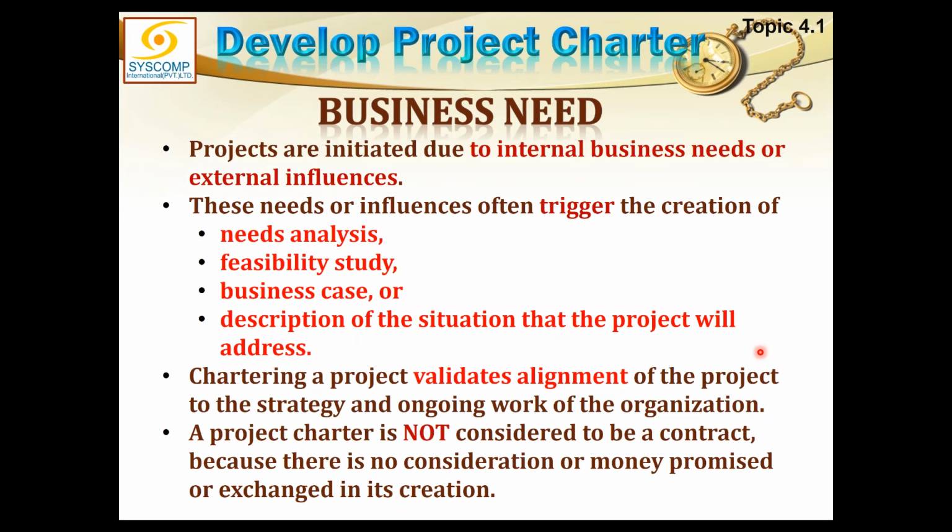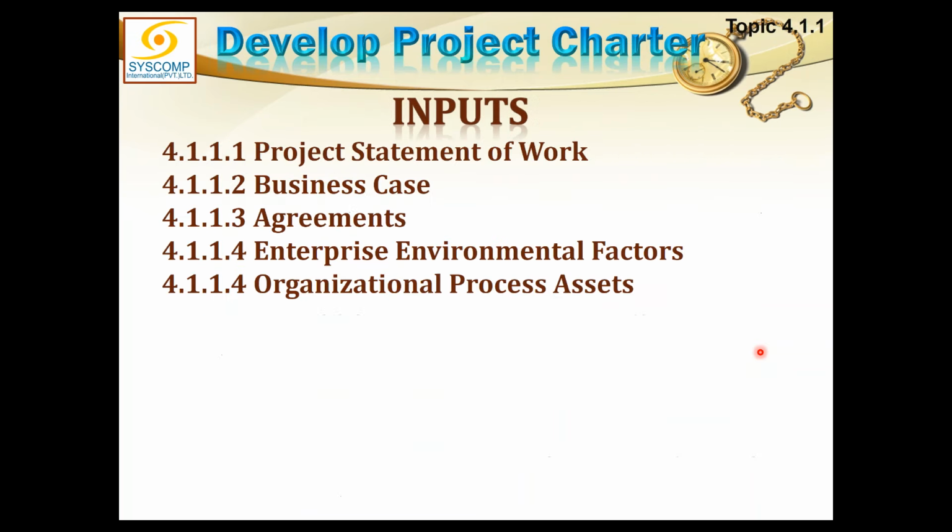Authorization. Because there is no consideration or money promised or exchanged in its creation. But when we are doing a contract, there is a commitment that this much money will be paid for this. So we are not doing that. This is kind of an assignment of a job.